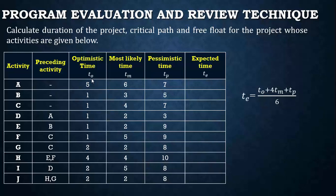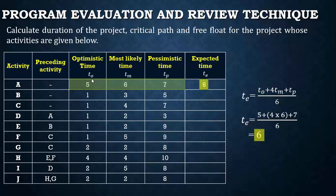First, let us find the expected time for individual activities using the formula. For the first activity, A, the optimistic time is 5, most likely time is 6, and pessimistic time is 7. Using this formula, the expected time duration works out to 6. Likewise, we can do the same calculation to find the expected time for each and every activity in the project.